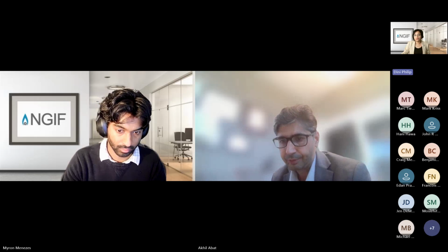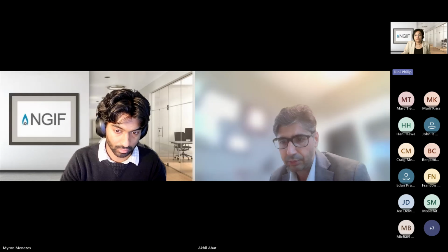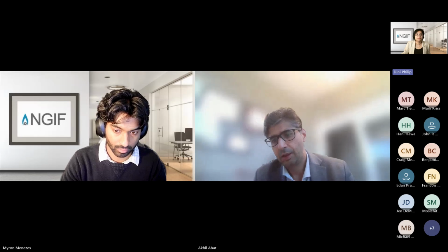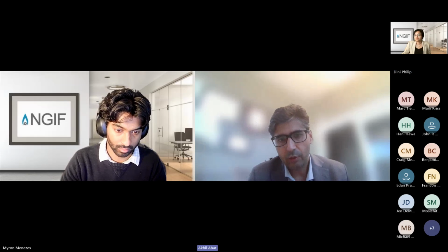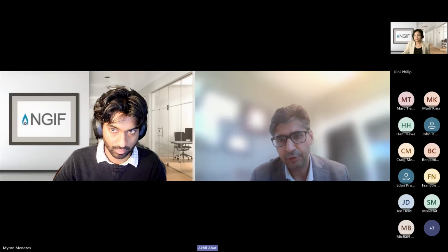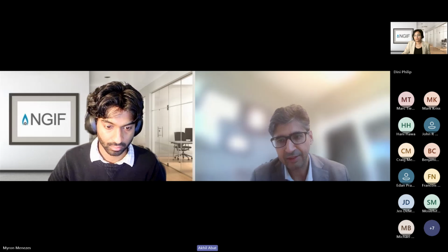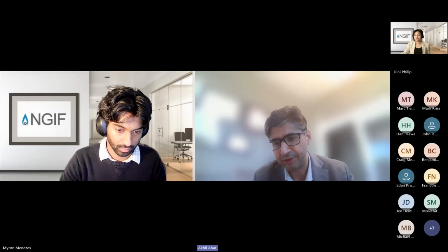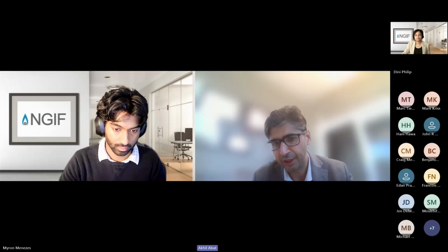Thanks, Akhil. Another question. What is the funding interval or sequence for a successful applicant? 100% at the start of the program or provisioned at certain milestones? Yeah, we provide funding based on the milestones. So however the project is framed, we will be asking for different milestones to be developed. And based on the completion of the milestones, we will be dispersing the agreed payment to the recipient.